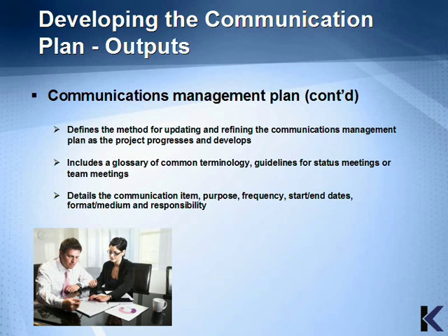Lastly, it defines the method for updating and refining the communications management plan as the project progresses and develops. It includes a glossary of common terminology, guidelines for status meetings or team meetings, and details the communication item, purpose, frequency, start and end dates, format, medium, and responsibility.